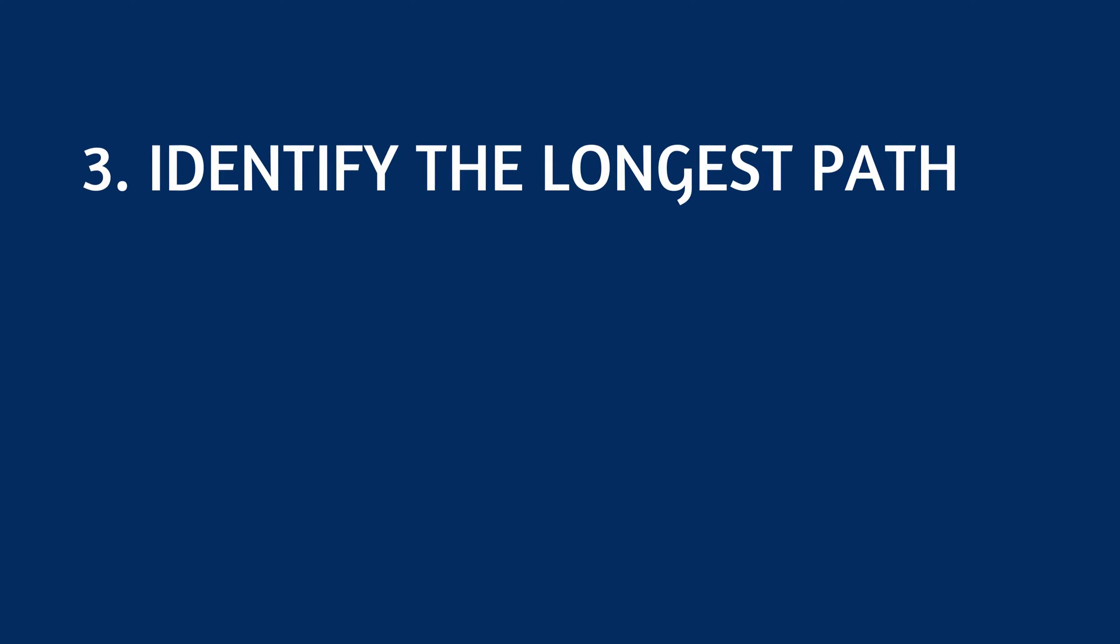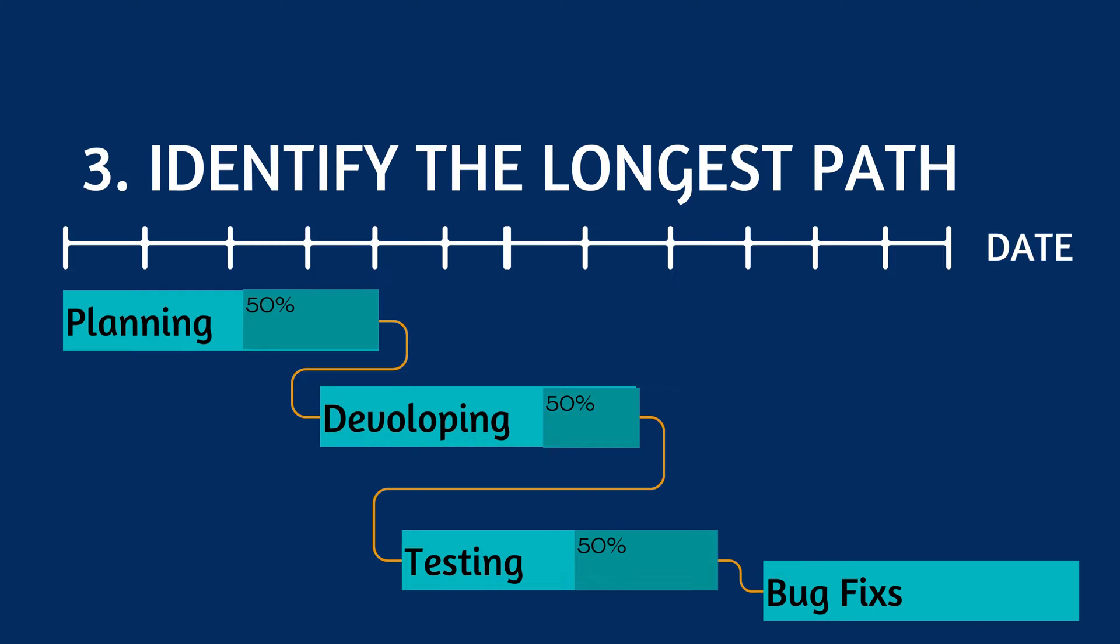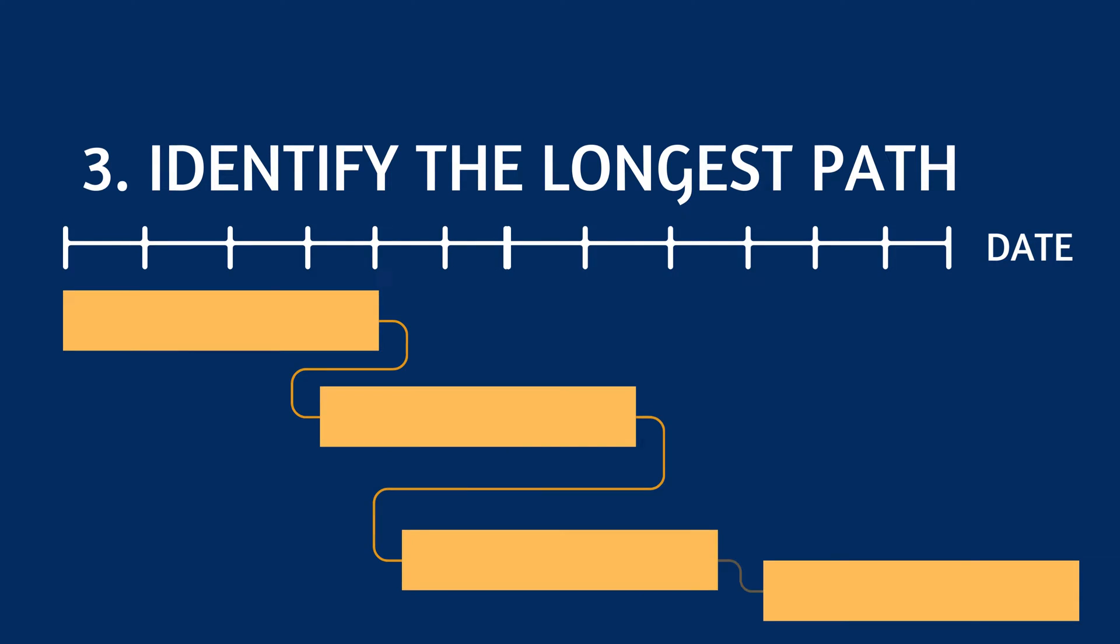3. Identify the longest path. Identify the longest path of activities in the project. This path represents the critical path.